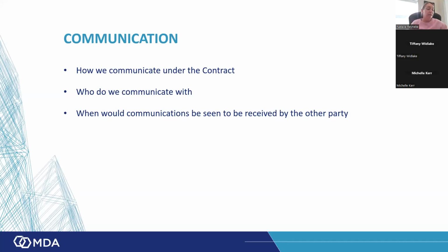The contract says many things, but that would be important as an adjudicator as well, because the notice periods in the contract specify, for example, that JBCC will say your notice of claim has to be submitted within 20 working days. So what are 20 working days? And what does it mean by submitted? Submitted will be when it's received by the party. So if you submit it on day 20, but the contract says that if it's an email, it's deemed received the following day, you may be out of time. Then you may be time barred.